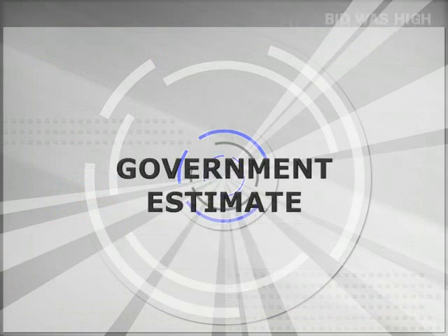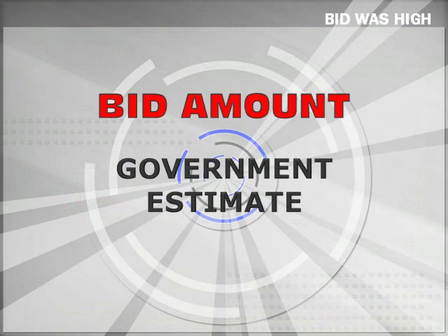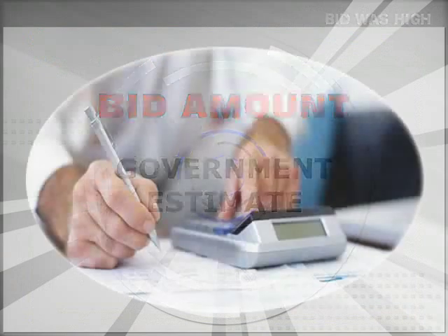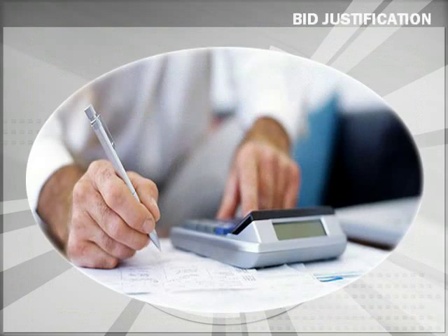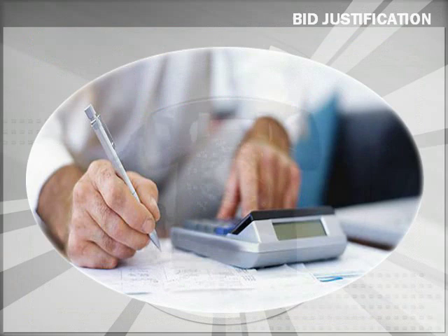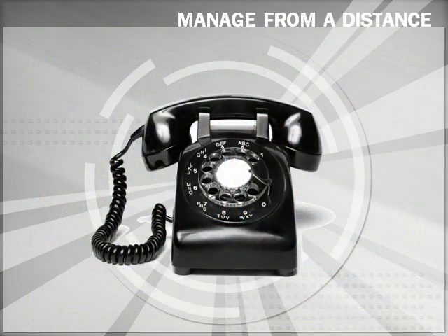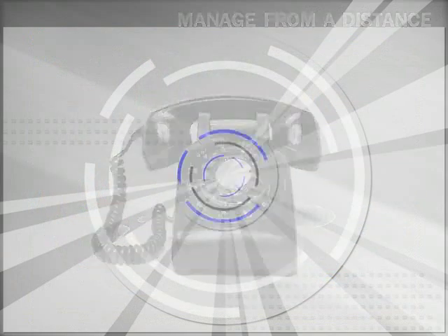Because our bid was over the government estimate, we were contacted by the Air National Guard with a request to negotiate. We responded with a detailed list of expenses that contractors incur and that are typically omitted from government estimates. After review, the government agreed to award the contract. A pre-construction conference was held over the telephone, minimizing travel expense for our client.